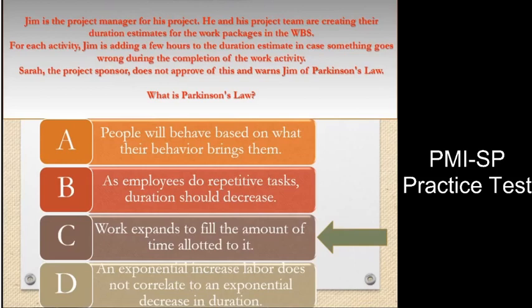Answer. C. Explanation. Parkinson's Law states that work expands to fill the amount of time allotted to complete the work. If Jim allows 25 hours for a project team member to complete a 20-hour task, it will likely take the team member 25 hours to do the work.